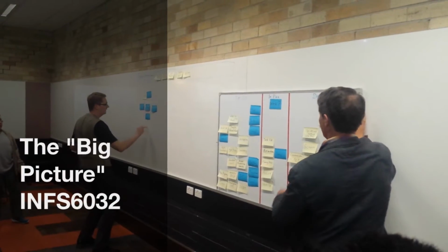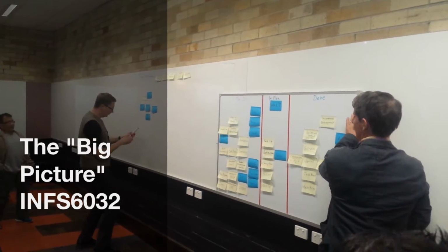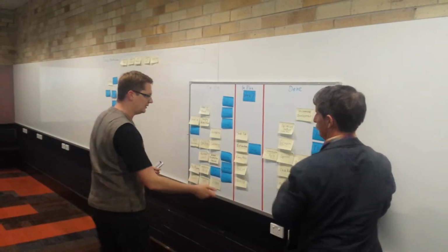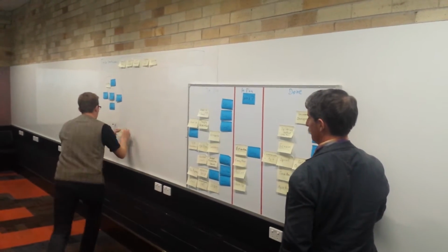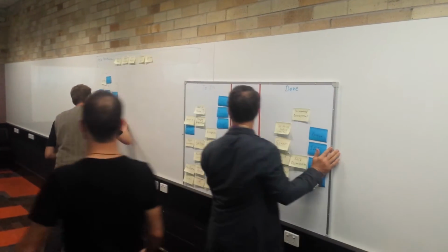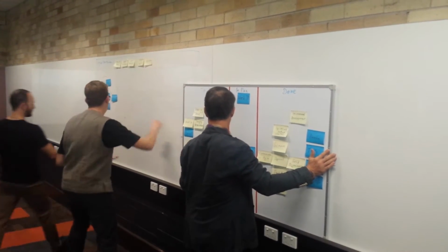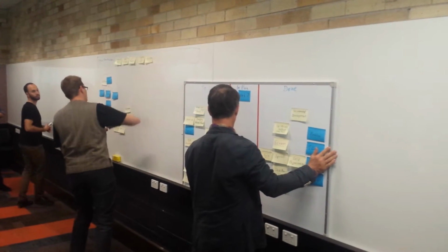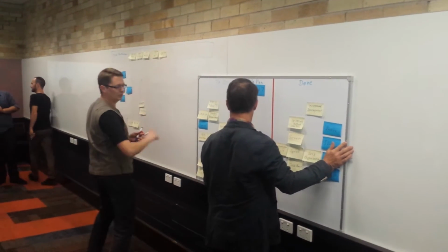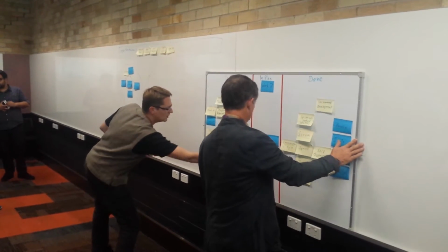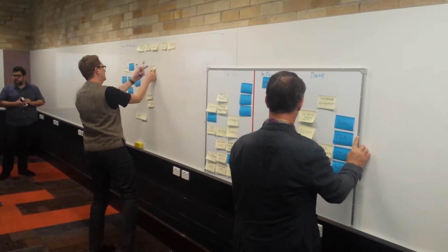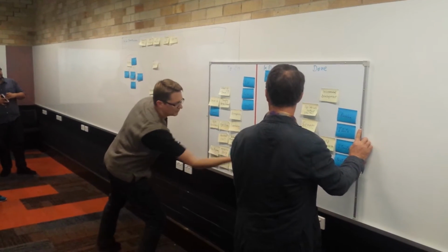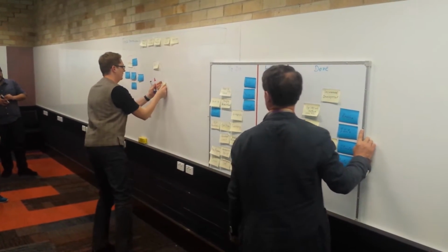So from this, you're moving on to user stories, okay? From the user stories, which will kind of be your task list, you're moving on to estimation, and you're doing this with planning poker. From this, you're moving on to prioritization, which we do with the Moscow technique, which we're going to do next week. This will lead you to creating the product backlog.